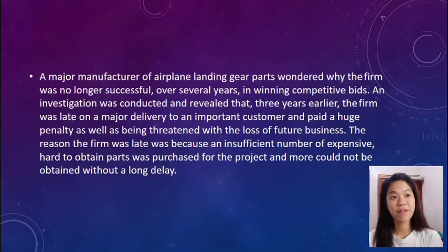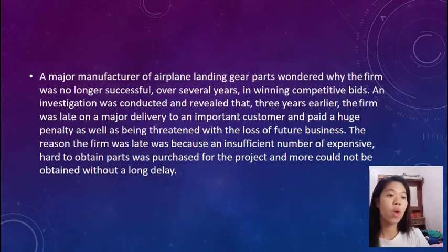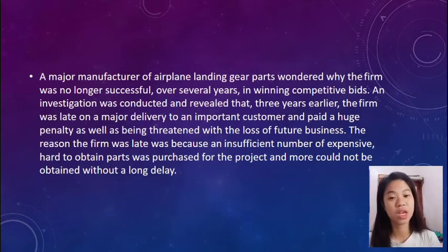Even organizational climate factors influence cost estimates. If the penalty for overestimating costs is much more severe than underestimating, almost all costs will be underestimated and vice versa. A major manufacturer of airplane landing gear parts wondered why the firm was no longer successful over several years in winning competitive bids. An investigation was conducted and revealed that, 3 years earlier, the firm was late on a major delivery to an important customer and paid a huge penalty as well as being threatened to lose a future business. The reason the firm was late was because an insufficient number of expensive, hard-to-obtain parts was purchased for the project and more could not be obtained without a long delay.